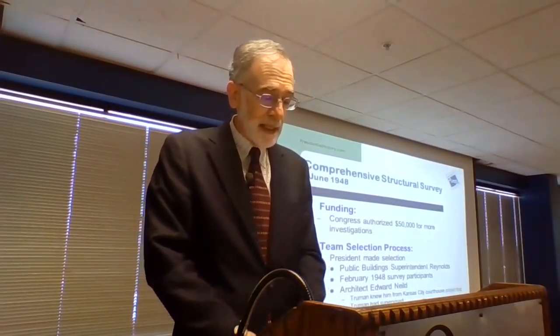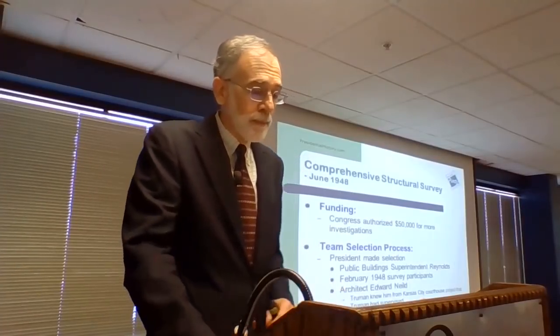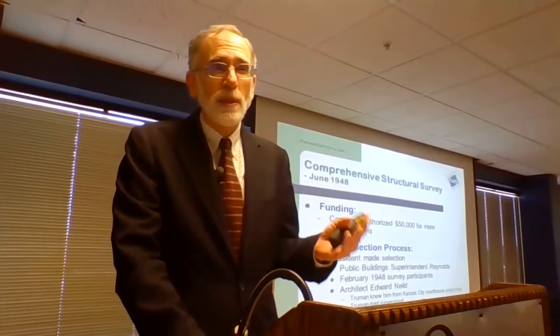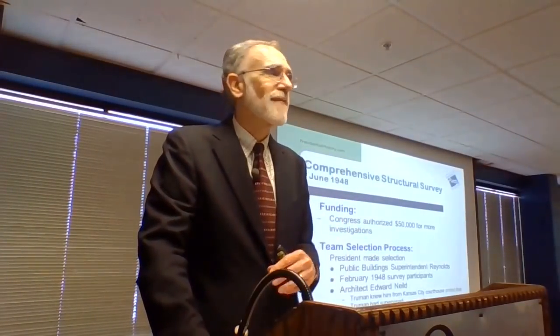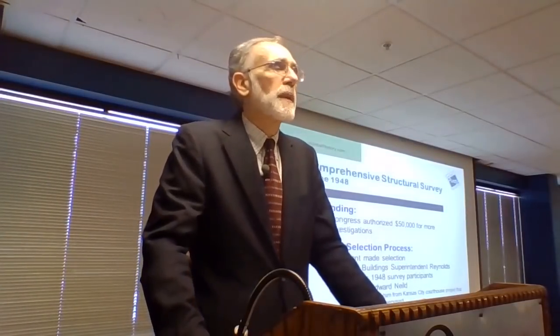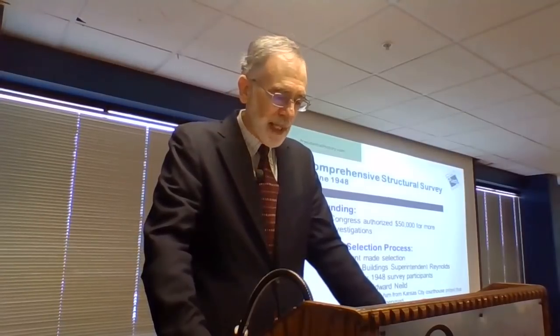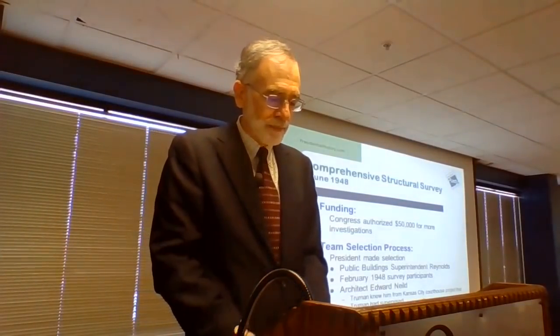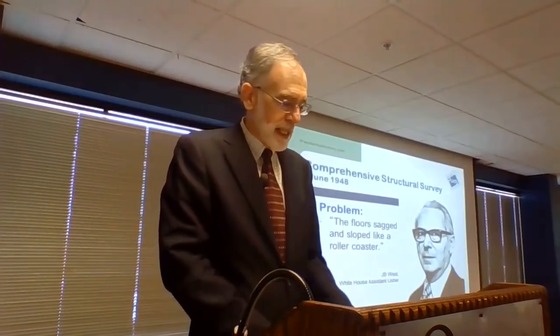So in June 1948, Congress ends up authorizing $50,000 to do a more comprehensive structural survey of the White House. Again, from a selection process, who's going to do this structural analysis? No selection process. The president picked the people, including an architect he had worked with in Missouri, the people who had been on the February survey of it, and the public building superintendent. So no public process for this highly political job. The assistant usher of the White House, he said that the floors sagged and sloped like a roller coaster.